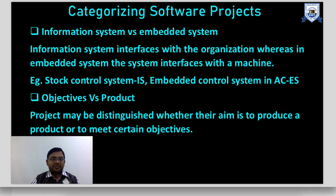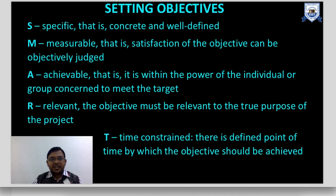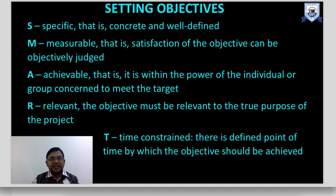A project may also be distinguished by whether its aim is to produce a product or to meet certain objectives. Setting objectives is an important part — your objective should be SMART: Specific (concrete and qualified), Measurable (satisfaction of the objective can be objectively judged), Achievable (within the power of the individual or group to meet the target), Relevant (relevant to the true purpose of the project), and Time-constrained (must be completed within a specific timeline).